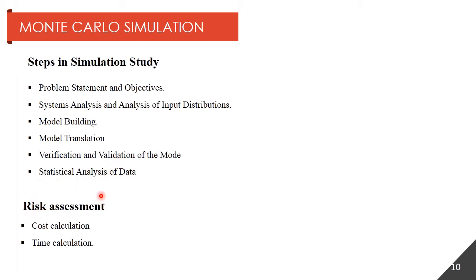The uses of the Monte Carlo simulation. Monte Carlo simulation in risk assessment is used as a quantitative risk assessment technique that needs exact data from historical reports, so it is used in many cases in cost calculation and time calculation.